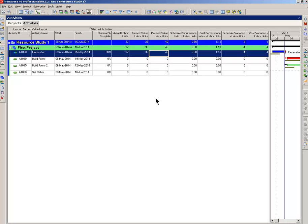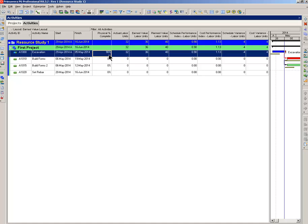We said we're going to have one laborer working eight hours a day times five days. So we plan to have 40 hours worth of work done. The laborer actually worked four days times eight hours a day. So 32 hours of actual labor. But going out in the field, we looked at his work. He's about 90% done. That's the physical percent complete right there. So 90 times the plan value of 40 gives us the earned value of 36 hours worth of work done. So the laborer is doing pretty good there. So we're going to take these three numbers and start producing some earned value parameters.